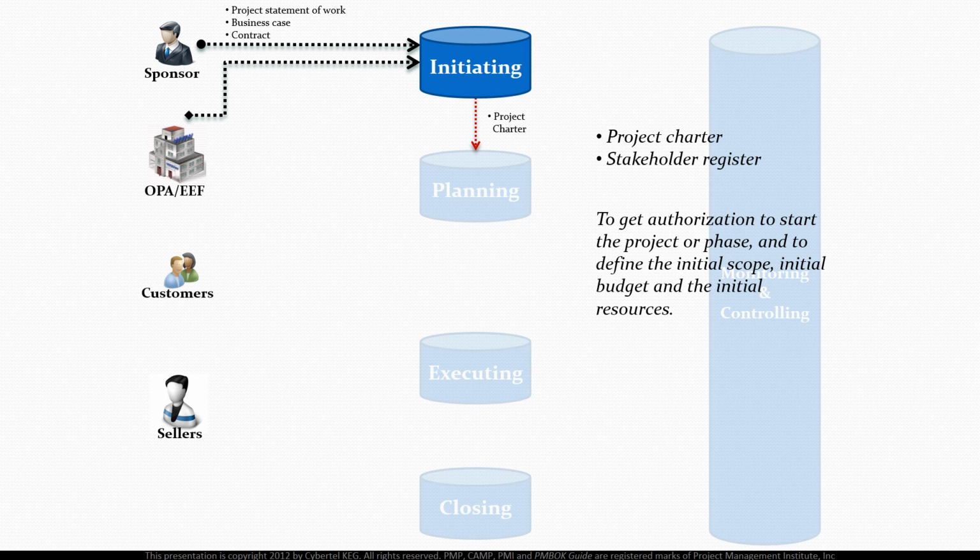Also, sometimes the initiating processes may be performed by program or portfolio processes, external to the project management processes. In this case, you as a project manager don't have to go through these processes. You will get the project charter and the stakeholder register ready to start the planning processes.